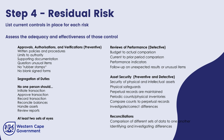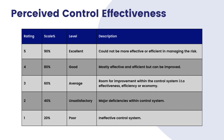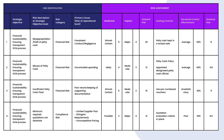We then move on to identifying our residual risk — the remaining severity of the risk after management intervention. We must identify all current controls in place for each risk and assess their adequacy and effectiveness. As discussed in the previous video on the risk management model, there are various types of controls. Once identified, we determine how effective each control is based on a scale. For example, if a control is perceived to be operating at good, it is operating at 80%, leaving a remaining risk exposure of 20%. Remember, no control can have complete or 100% coverage over the risk.